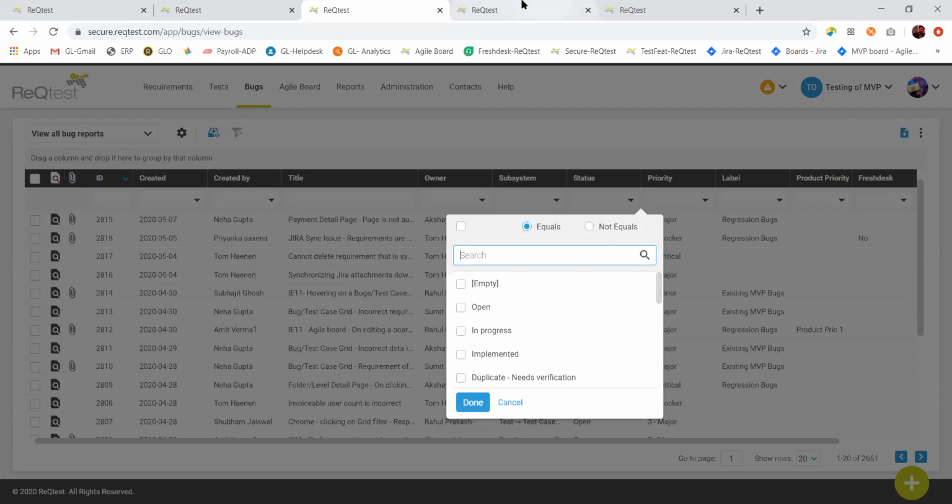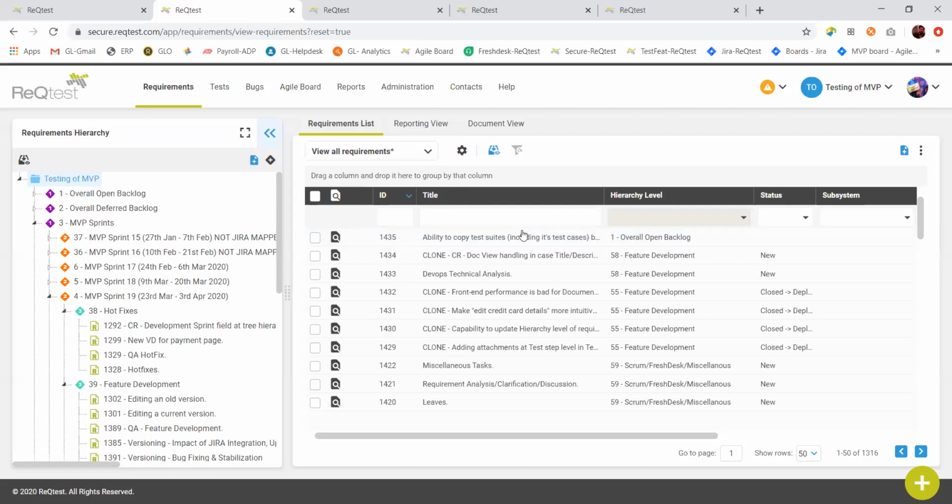Another example to share with you. Take the way we function with requirements. There are two key aspects whenever we write a requirement. Taking one requirement as an example, my product owner creates a requirement. At the initial stage he is the owner of that requirement and he sets the status as open. He is detailing those requirements. Then he will set the status of that requirement to approved.